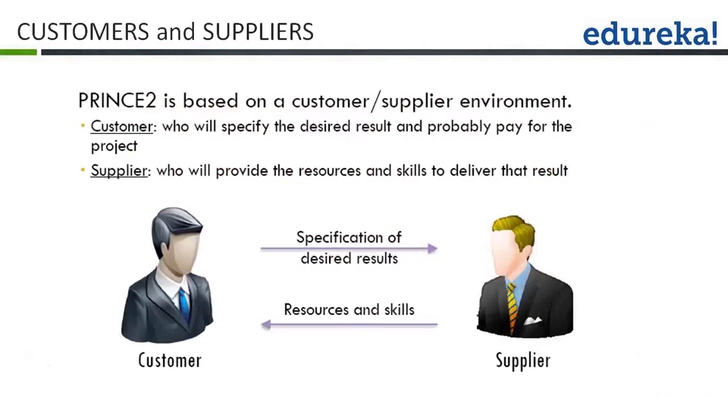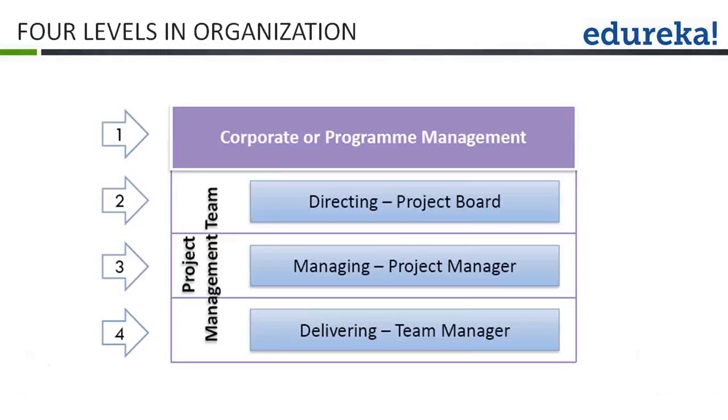A very, very important point to note about Prince2 is that Prince2 is based on customer and supplier involvement. The customer will specify the desired result and probably pay for the project. The supplier will provide the resources and skills to deliver the results.